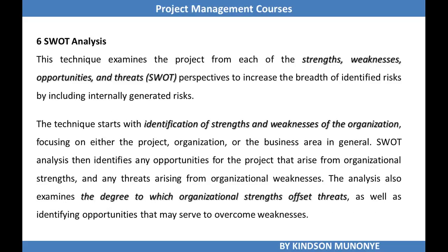SWOT analysis, yes, this is important. The SWOT analysis examines the project from each of the strengths, weaknesses, opportunities, and threats perspectives to increase the breadth of identified risks by including internally generated risks. The SWOT technique starts with identification of strengths and weaknesses of the organization, and it focuses on either the project, the organization, or the business area in general.